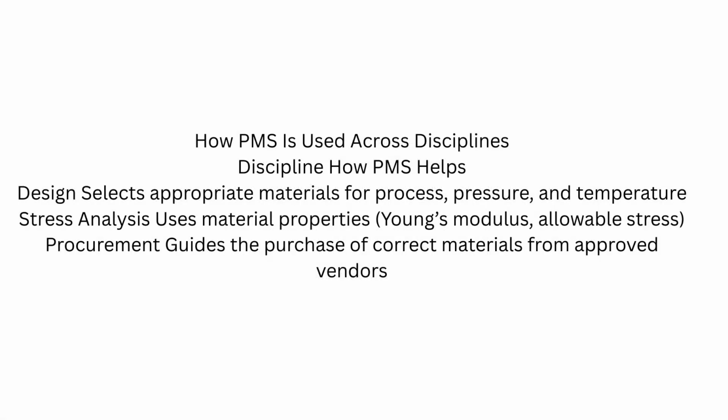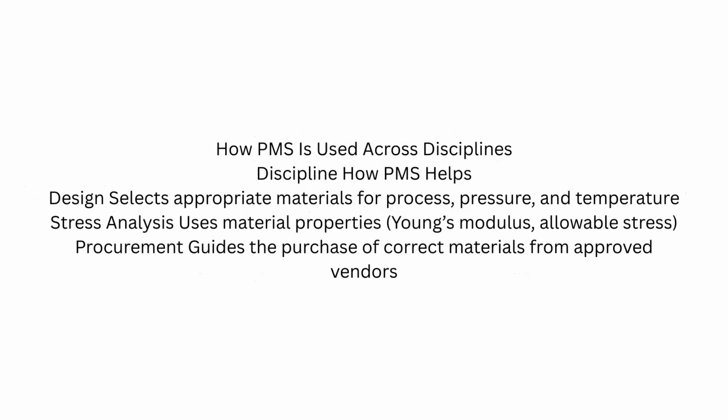Discipline and how PMS helps. Design selects appropriate materials for process, pressure, and temperature. Stress analysis uses material properties, Young's modulus, allowable stress. Procurement guides the purchase of correct materials from approved vendors. Construction ensures welders and fitters use correct materials and joints. Inspection and QC specifies test plans, inspection requirements, EMTCs. Commissioning ensures systems are hydro-tested with correct pressure based on PMS.